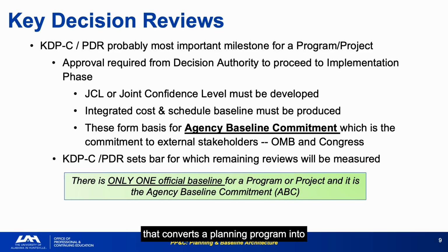KDPC/PDR is the gate that converts a planning program into a committed program. It establishes the agency baseline commitment, ABC, the official JCL, and the integrated cost and schedule baseline. There is only one official baseline for a program, and it is the agency baseline commitment. Everything produced before PDR is in service of creating that one document.